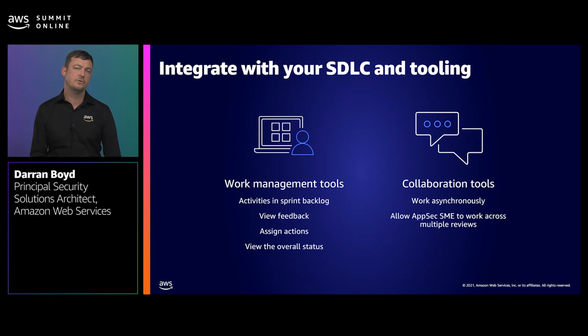Next up is you want to deeply integrate with your software development lifecycle and tooling. You should be treating threat modeling in terms of its activities and deliverables no different from any other project or software deliverable that you deliver as part of your SDLC. What this means is that you want to reuse your work management tools, your issue management tools, and put the activities for threat modeling on the sprint backlog just like any other deliverable.